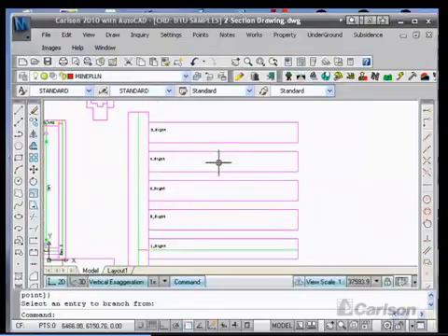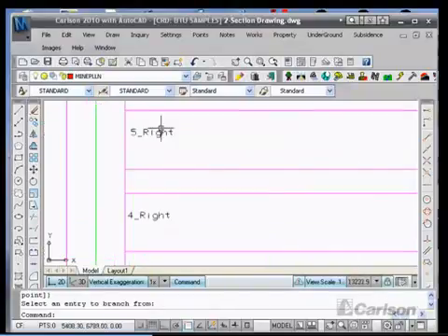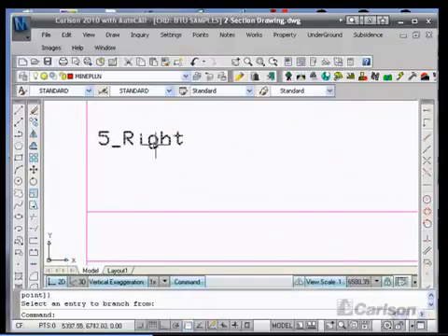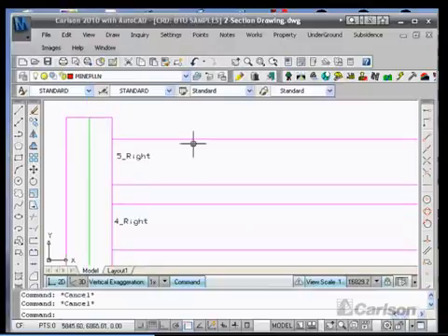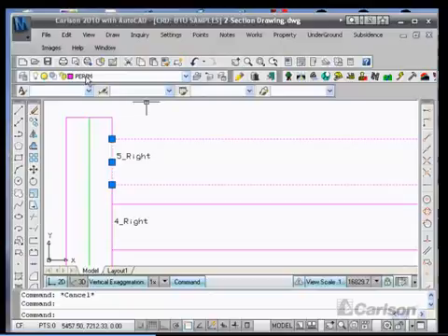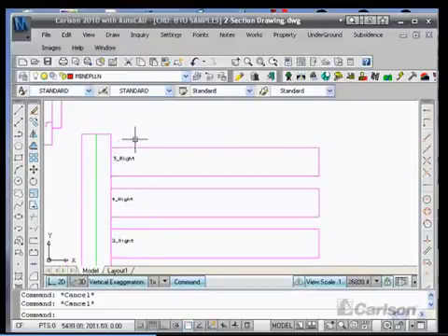There's a quicker way, and it's called Auto Place Panel by Text. It has a prerequisite where you have to have the text pointed in the direction that you intend to mine on the layer panel MM, which I have in this case. The line work for the perimeter is in the perimeter layer, so I have the line work prerequisite set up.